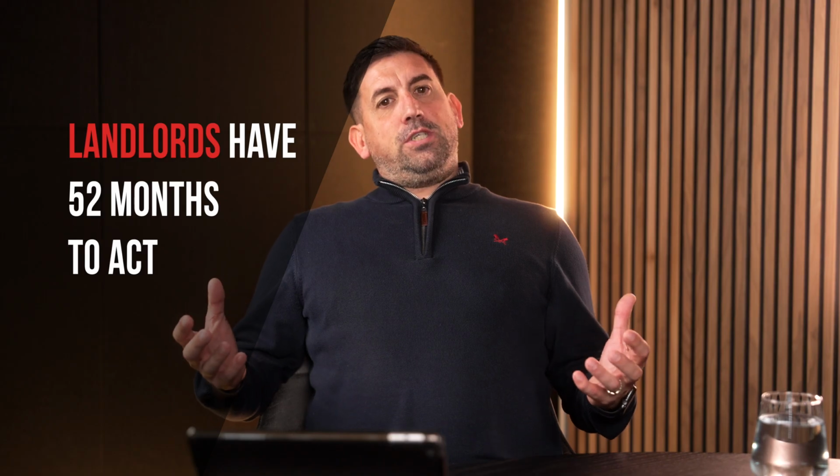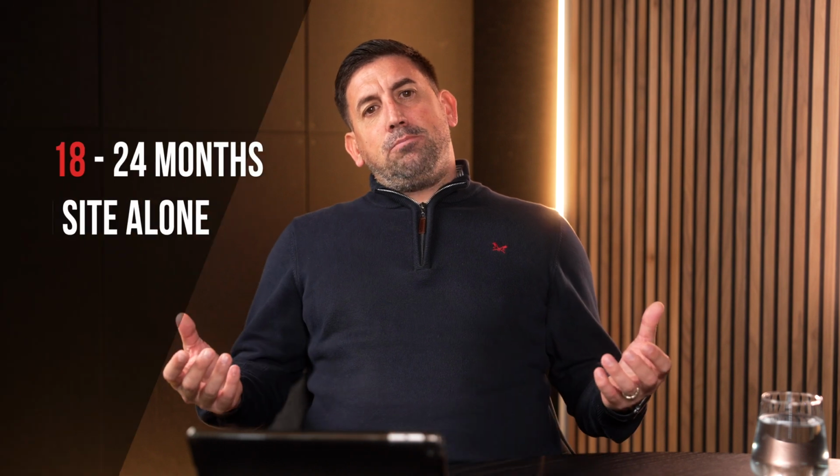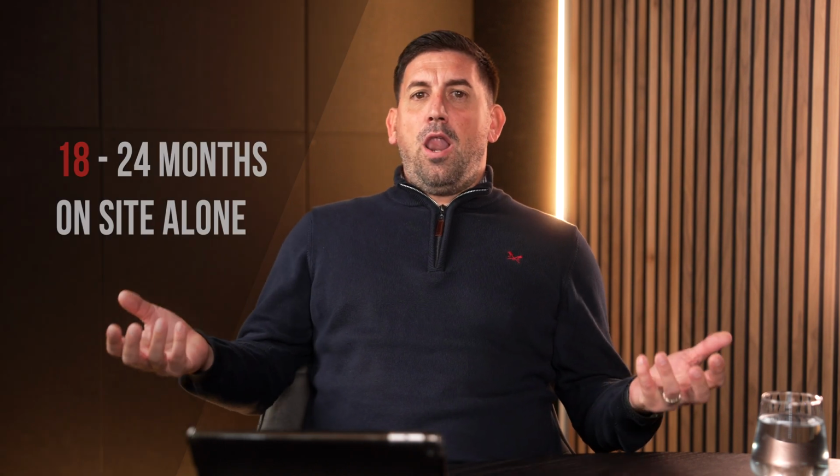So thinking about the deadline in relation to buildings over 18 metres, this means landlords have 52 months from now to actually get these buildings remediated. When we look at some of the more complex schemes where you have a full residential development of multiple apartment blocks and buildings, you can conceivably be looking at 18 to 24 months on site alone. So that's 2 years eaten into the 52-month period.